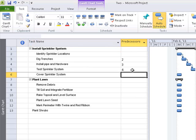Finally, if you want to link a series of tasks, you can highlight them all, then click on the link button in the schedule command group on the ribbon.